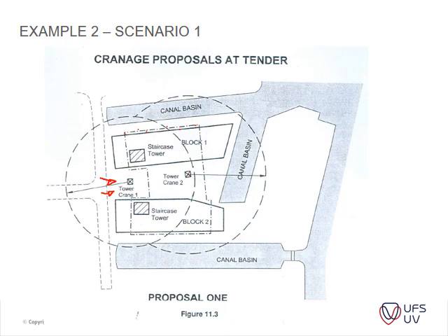Tower crane 2 is to be located in the basement area and is to have a jib radius of 30 meters. The crane is to be erected as soon as excavation works are complete and is intended to provide all lifting operations within the basement area. Okay. Rebar, formwork, etc. All major concrete pours to floor slabs and walls will be undertaken by static concrete pumps, and smaller pours with concrete cranes and skips.